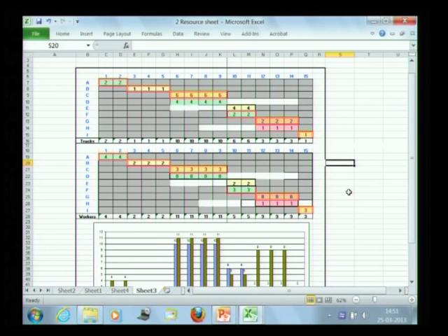Right now we can't see anything else, but this is where an automated system would be useful. Now for argument's sake, let us say we were able to resolve this. You can find a resource profile here. So for example, something here which will make it totally contradictory. The minute I resolve the worker issue, the trucks become over allocated, and there is no solution possible within the floats.